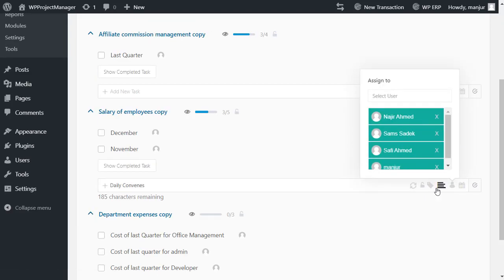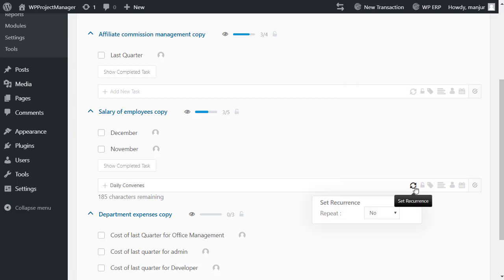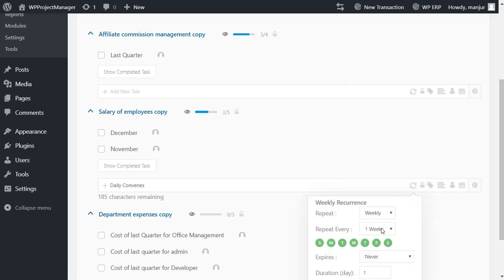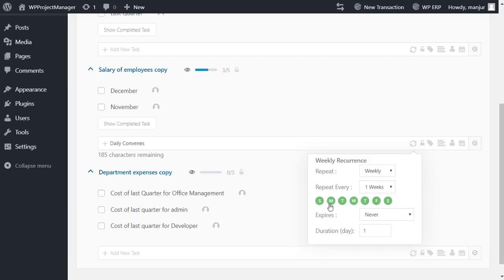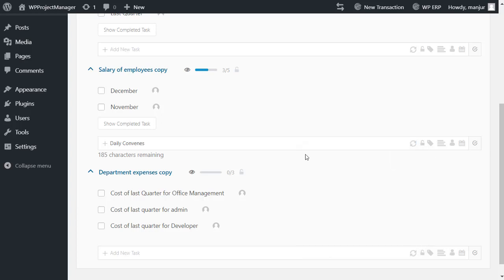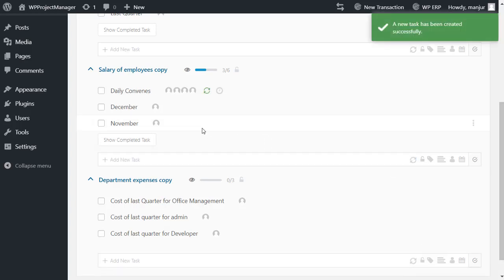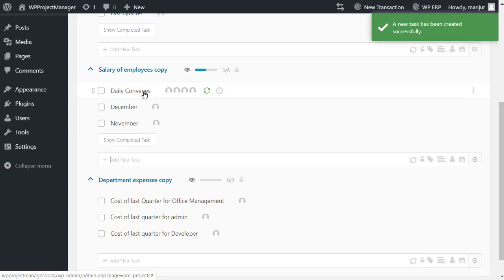Then click on the set recurrence icon. From a drop-down menu you'll be able to set the frequency of recurrence. Let's set one up for one week. If you want, you can set daily, monthly, and yearly recurring as well. Your recurring setup is done. Next week on the same day, this task will be generated automatically.